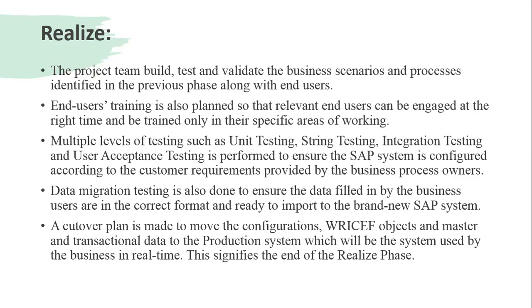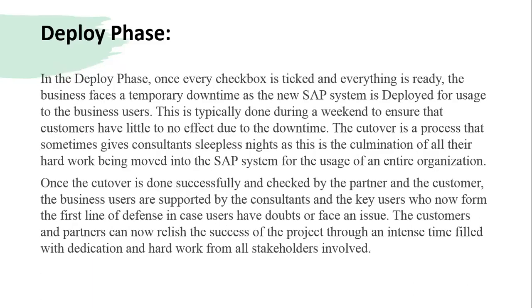Now, a cutover plan is made to move the configurations, RICEFW objects and master and transaction data to the production system, which will be the system used by the business in real time. This signifies the end of the realize phase. Deploy. In the deploy phase, once every checkbox is ticked and everything is ready, the business faces a temporary downtime as the new SAP system is deployed for usage by the business users. This is typically done during a weekend, to ensure that customers have little to no effect due to the downtime.